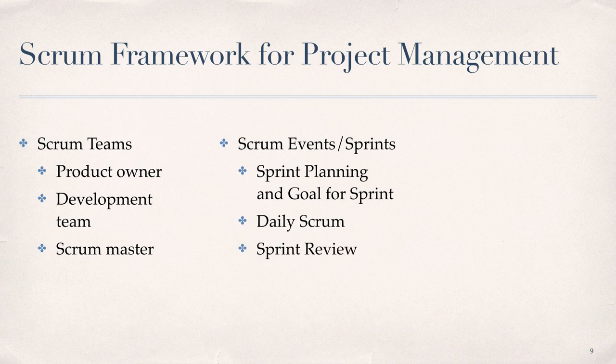A sprint review is held at the end of the sprint to inspect the incremental product deliverable and adapt the product backlog if needed. During the sprint review, the Scrum team and stakeholders collaborate on lessons learned from the work done in the sprint. In this class, the sprint review will occur at the beginning of the class meeting just prior to planning the next sprint. For example, sprint one will cover modules two and three, and the sprint review for sprint one will occur on the first day of module four just prior to the sprint planning session for sprint two.